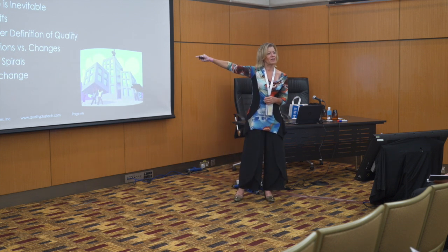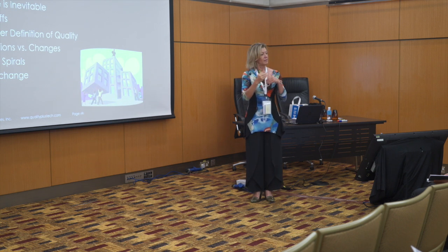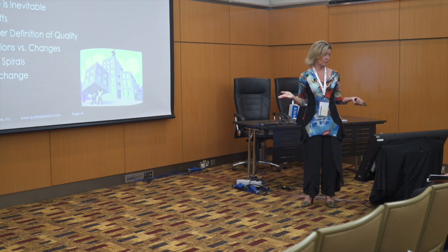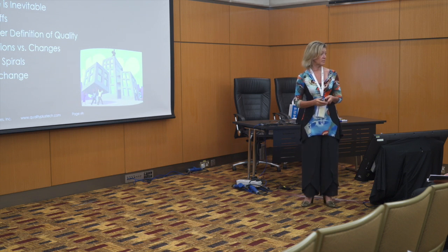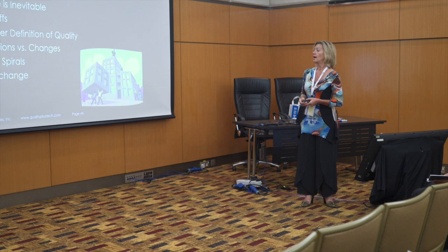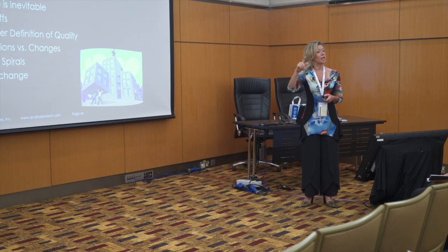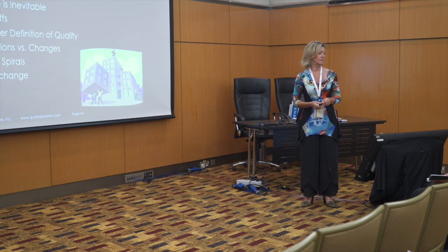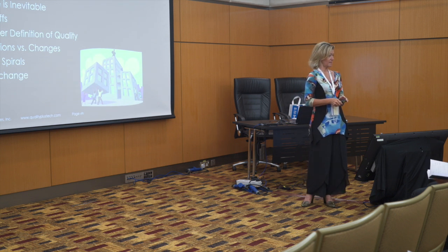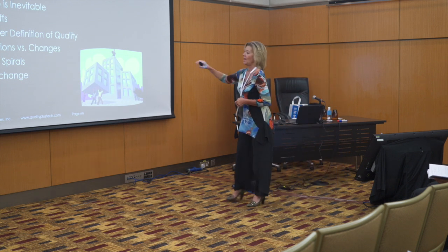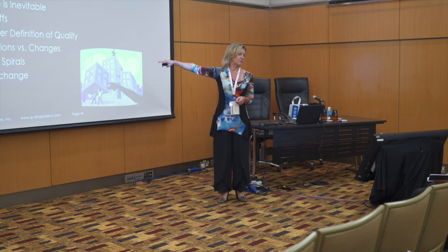Especially in fixed price contracts where you've signed up for something, you've said, okay, we will deliver you this piece of software within this time frame and for this cost. And so in comes the supplier, or the supplier says, this is a change to the requirements. And what does the user say? No, that's a clarification. I always meant it to be this way. So is it a change or is it a correction? And then we end up with something called rework spirals. Do you know what that is?